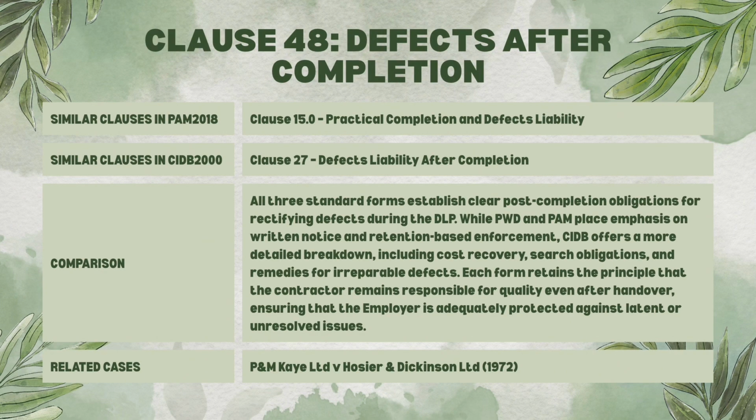The next topic is defect after completion. PWD clause 48, defect after completion. PAM contract clause 15, practical completion and defect liability, and CIDB clause 27, defect liability after completion. All three standard forms establish clear post-completion obligations for rectifying defects during the DLP, while PWD and PAM place emphasis on written notice and retention-based enforcement. CIDB offers a more detailed breakdown, including cost recovery, search obligations, and remedies for irreparable defects.